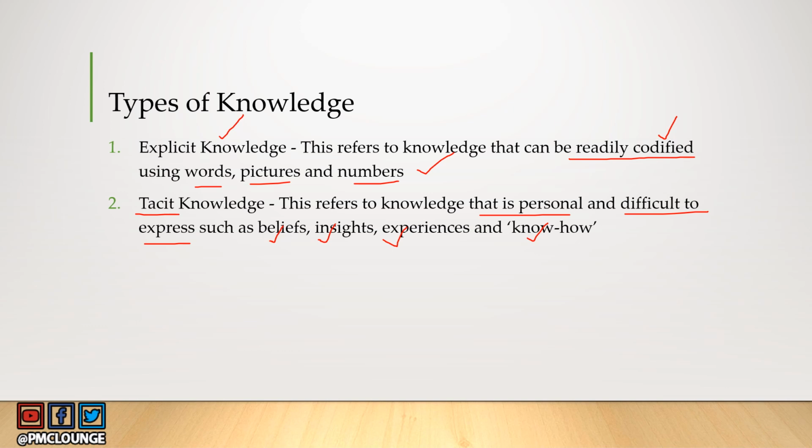Now, based on your experience, based on the 5 projects that you have delivered, the security department asks for 2 weeks to provide their approval. This is explicit knowledge. This is something which can be written down, jotted down, and if you are giving a knowledge transfer to a potential future project manager, you can simply tell them that the security team requires 2 weeks to provide the approval.